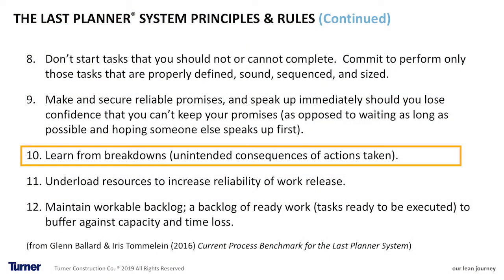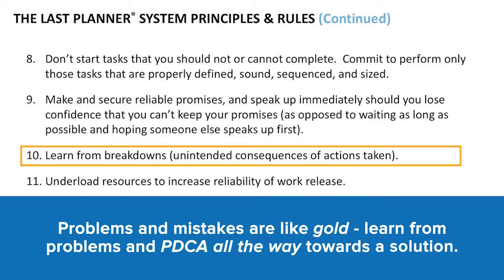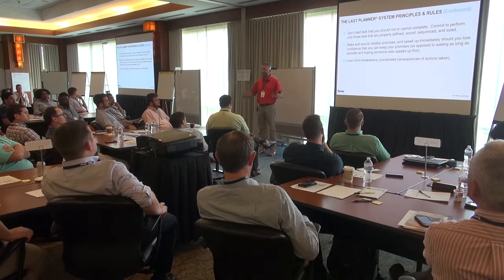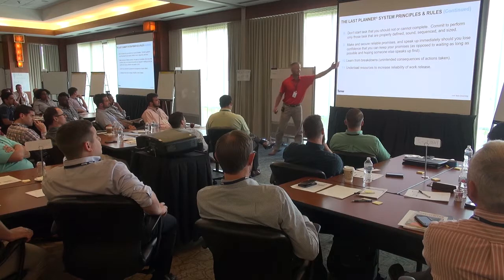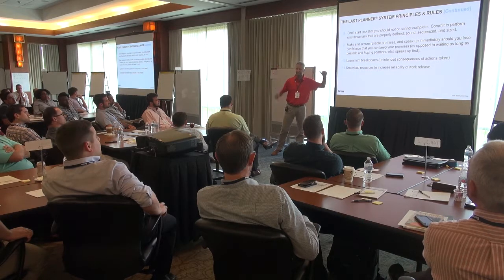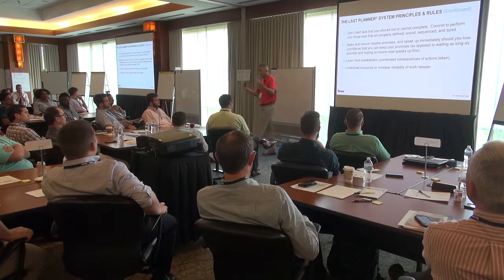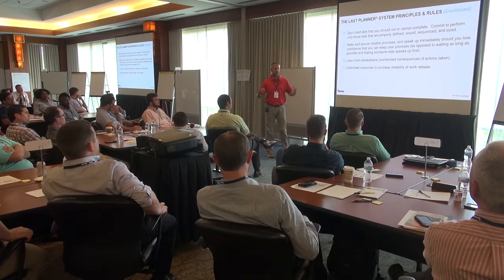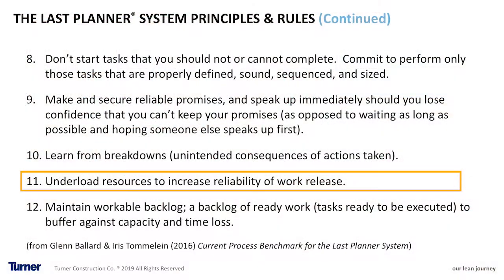Learn from the breakdowns. How do we improve? PDCA again. And back to this, don't just do PPC, but actually be lean. How do we truly improve from where we're not performing well? Unload resources to increase reliability of work release.